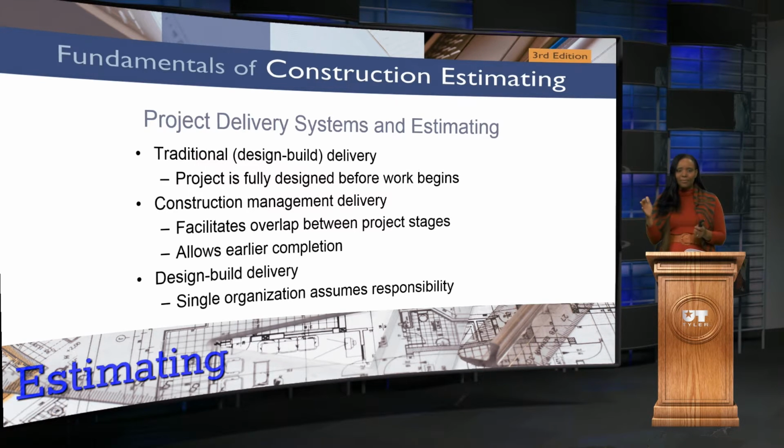but there's a little bit of overlapping here between project stages, but it does allow for earlier completion. So for instance, when I say earlier completion, you see a lot of fast track type projects that do CM type projects, okay? And then we have the design build, which a lot of people really do like, because it's like a one-stop shop.